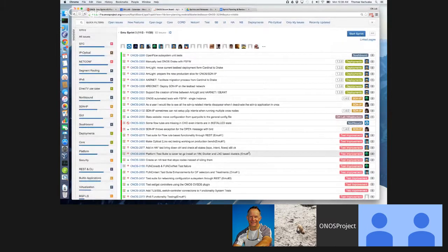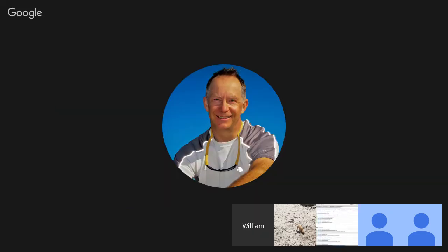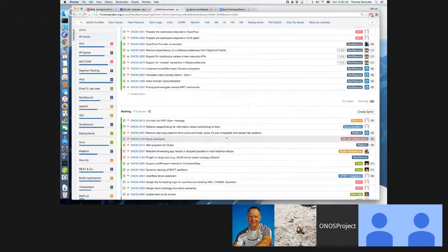So with these points in mind, I think we can switch to the Scrum board and start taking a look at what was already loaded in the sprint. We're going to go through this epic by epic, but just as a small reminder, in contrast to the last point that I just made, you can already see that we have 186 points of work in here. So unless our sprint velocity changes somehow, I predict that we will probably leave something like 50 points on the table at the end of the sprint. So let's keep that in mind.